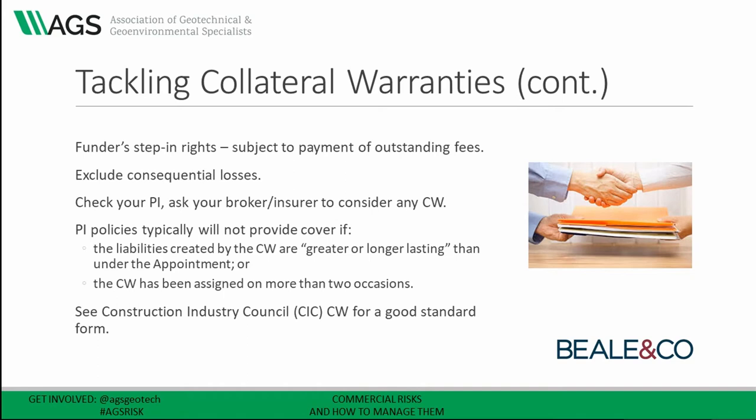In any collateral warranty, we would want to see an exclusion for any consequential losses, such as loss of profit. The losses suffered by the nature of the parties who are beneficiaries of the collateral warranty are likely to be of a type and extent that your original client would not have suffered — for example, loss of rent, business interruption, and so on. So we would want to see those excluded.